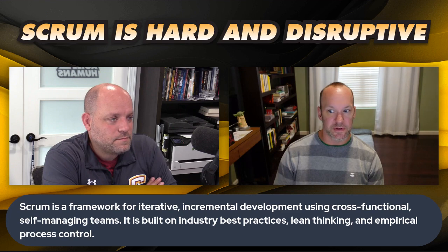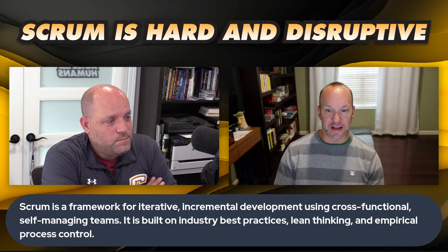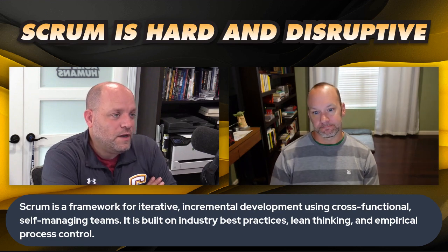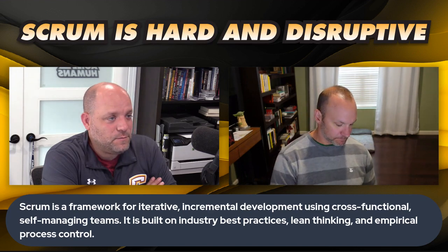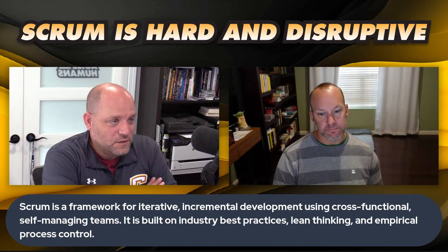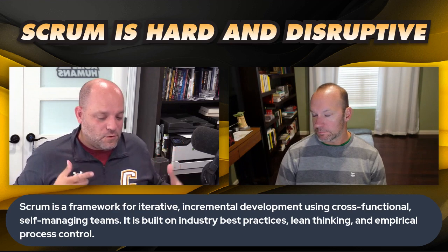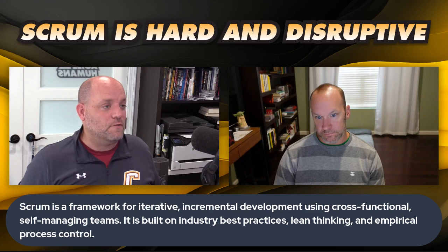Maybe a daily Scrum that's 15 minutes long, right? That's a good practice for developers to get together and have that conversation. Maybe a best practice is in 30 days or less, right? That's the duration of a sprint. Other than that, I wouldn't say Scrum is really filled with a ton of best practices. Well, I think they've actually been peeled away. And what's interesting is perhaps earlier versions of the Scrum Guide had a few specific things, like standardized questions for the daily Scrum, for example. And as we've learned going forward, and Ken, I think, is spot on here, industry best practices are all over the current version of the framework.